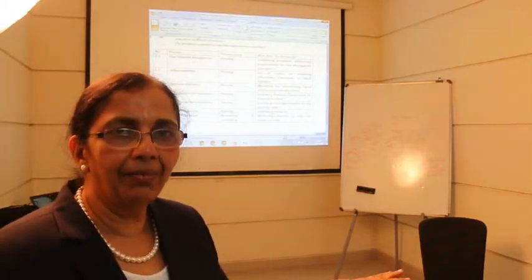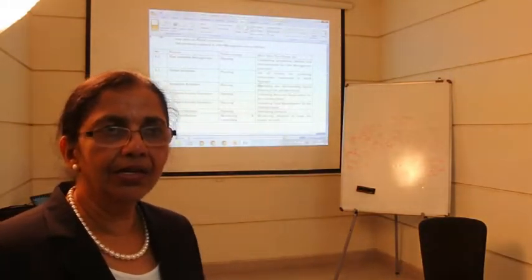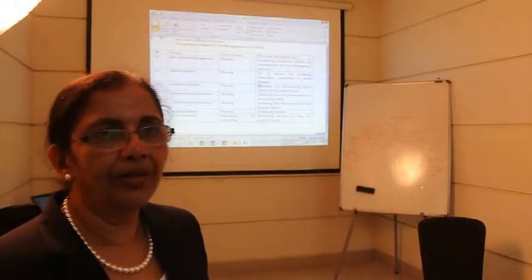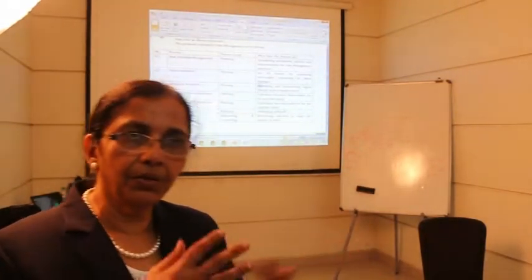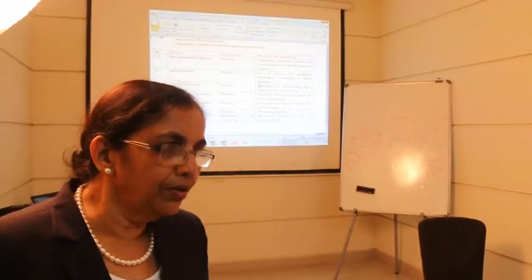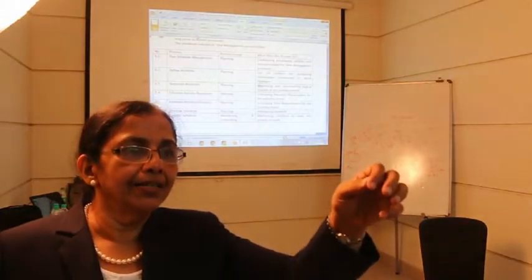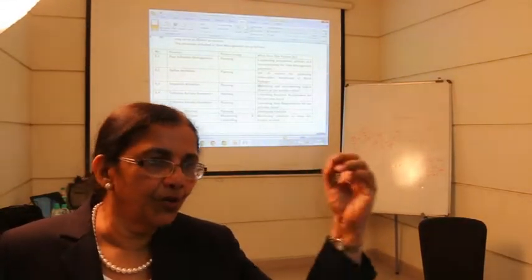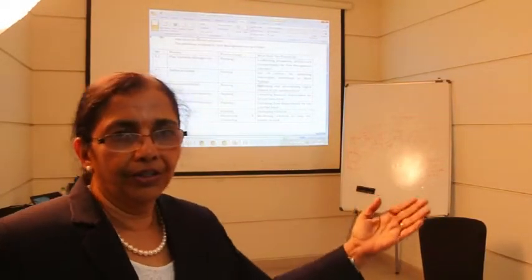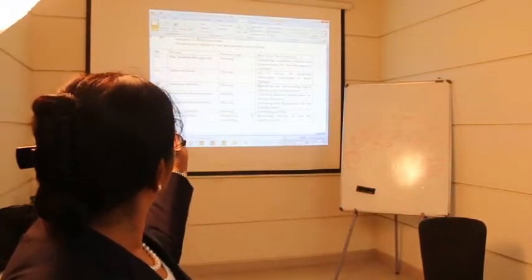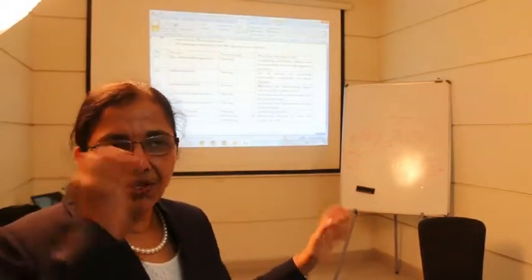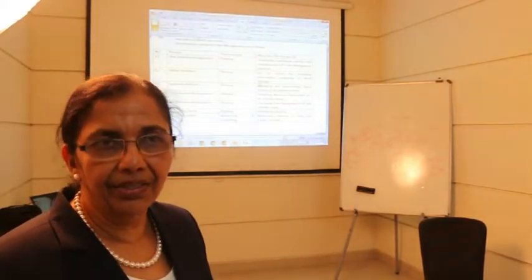Before the slab is done, can you start the walls? No. So there is a relation between slab and walls. So there will always be relation between 2 activities. So what usually you will do is you will draw charts that define relations between the activities and total time for the project. So you are doing sequencing activities. Once the activities are sequenced, which activity first, which next, which parallelly, everything.